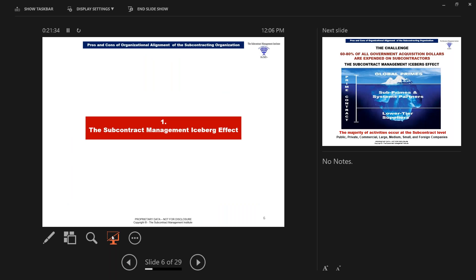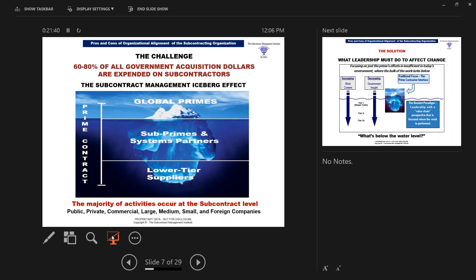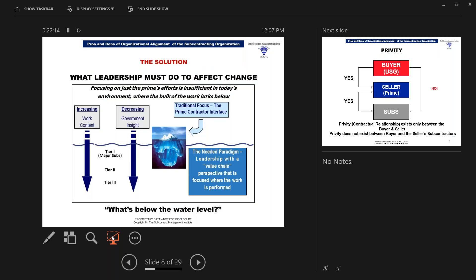Let's talk about what we refer to as the subcontract management iceberg effect. 68% of all government acquisition dollars are expended on subcontractors, yet all the attention goes to the prime contractor. Not sufficient information or performance is known about those subcontractors. The majority of activities occur at the subcontract level. We've got public, private, commercial, large, medium, small, and foreign companies involved in this process.